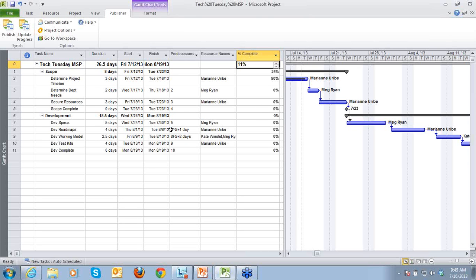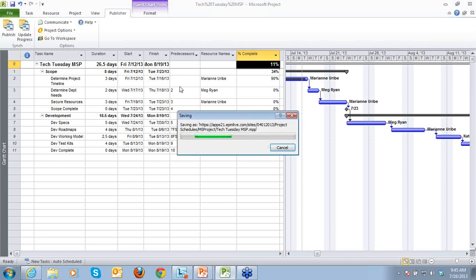When I'm ready to publish and tell my team that I've made my changes and have those changes reflected back in EPM Live, I need to click Publish one more time, and this will start the process and push any changes that I've made here, those accepted and rejected, back through EPM Live. So back in my work, the one that was rejected would go back to 0%.